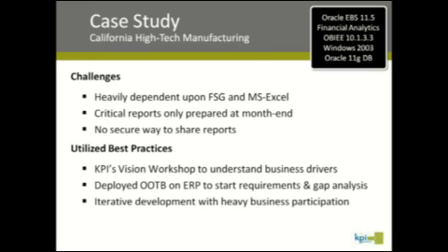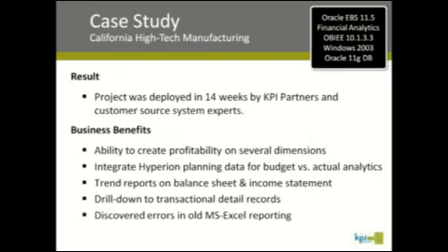It's something that we do as part of our methodology. That workshop really brought together business and IT to understand what the key business drivers were. We also deployed the out-of-the-box financial analytics on the ERP system to drive the requirements and gap analysis, and not doing it in a vacuum, blank sheet of paper kind of thing. And we took a very iterative approach with heavy business participation throughout the project. The result was a project deployed in 14 weeks by the KPI team, and we leveraged heavily the customer source system experts in their financial system.